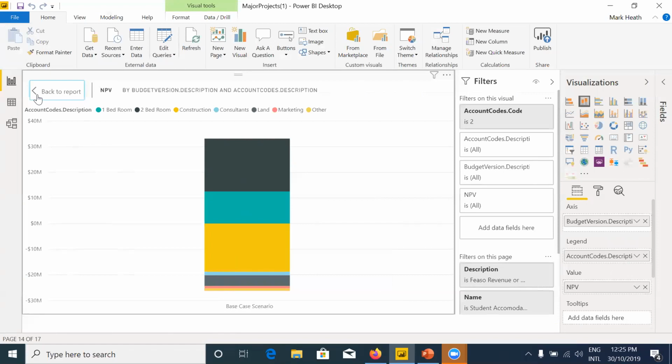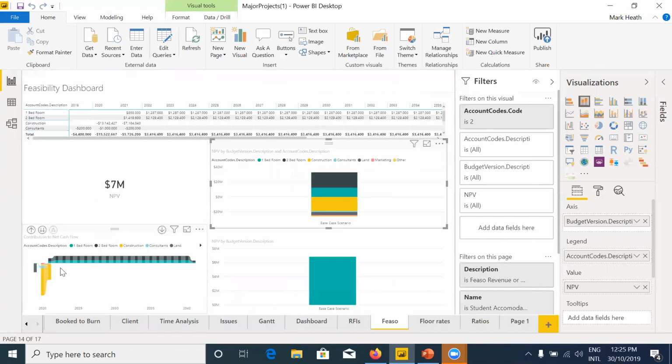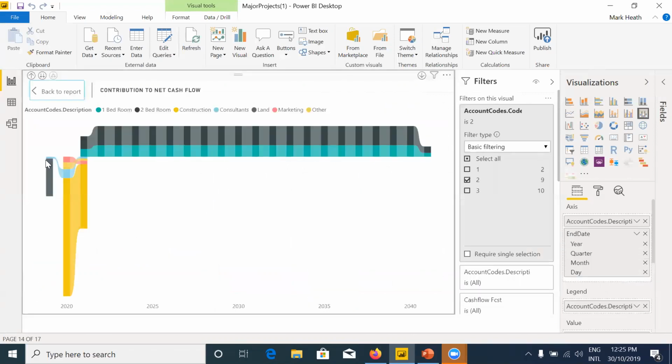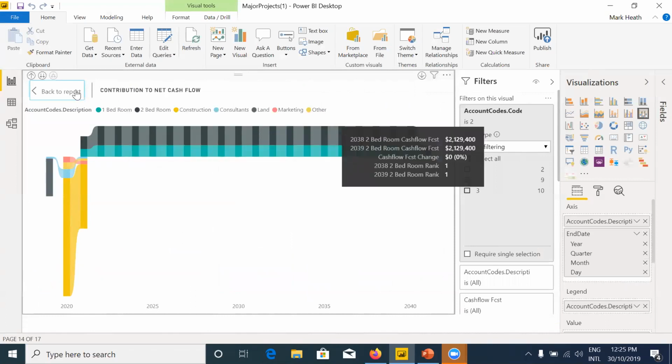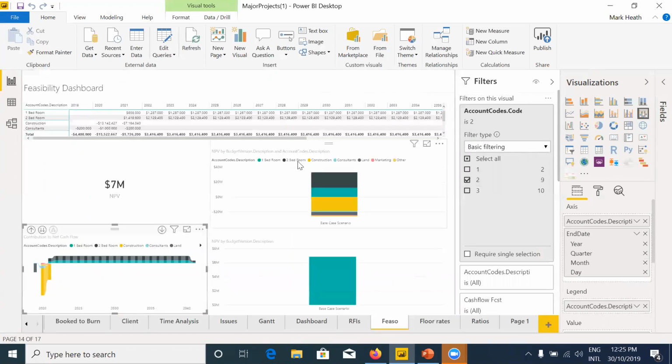And as you get more complex NPVs, you can scenario model how sensitive it is to changes in those variables, which we'll demonstrate in a moment. This also profiles it visually, as you can see the land, that's that black line coming out here, and then construction costs, and then revenue coming in over time. So this is just one scenario. The what if is generated very, very quickly once you've got these models set up.